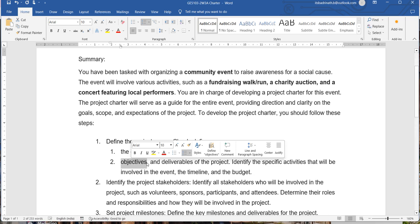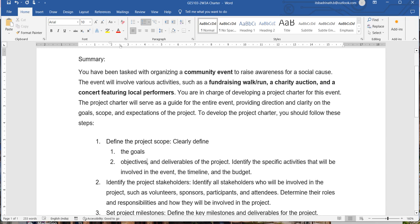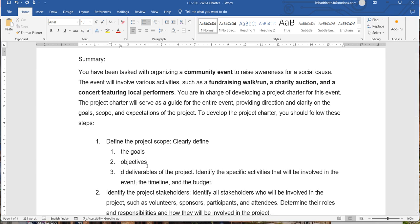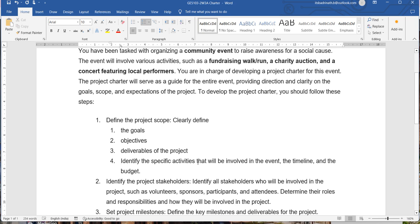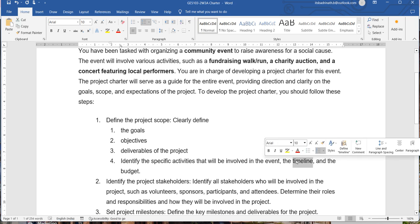Each goal may consist of two or three objectives. This is how we write it. Finally, you should mention what deliverables your project will have. In addition, you discuss specific activities that will be conducted as part of the event, and for each activity you should mention the start date, end date, and the associated amount. These things should be mentioned as part of the scope.